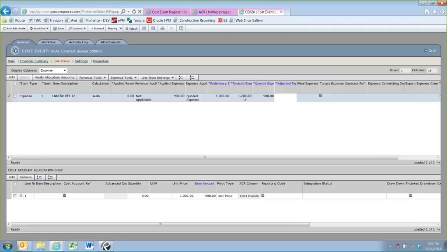Now the one thing to note is if you ever want to zero out a line item, maybe you don't want to delete the line but you want to keep it, but you want it to be worth $0, you do have to delete or enter a 0 in for each of those fields. Otherwise it's just going to go backwards and read the next non-zero value. So I had to plug in zeros in all three of those fields to get the line item back to $0.